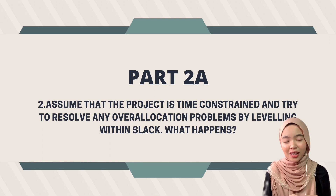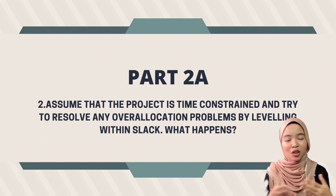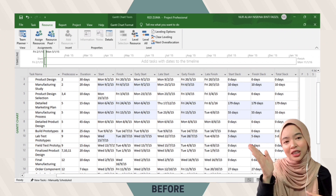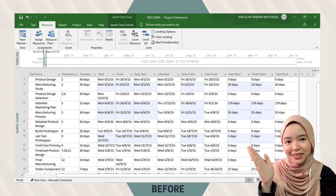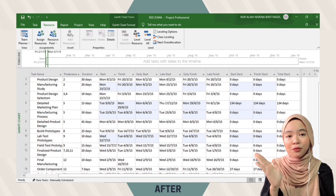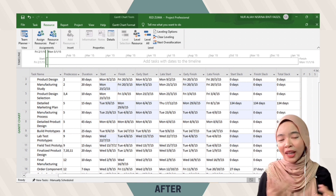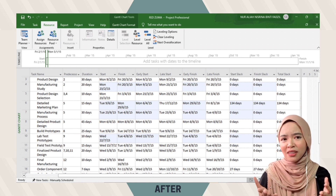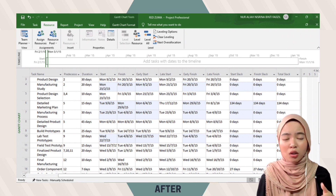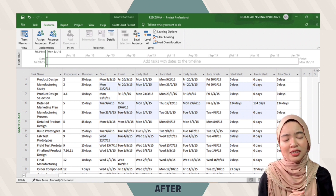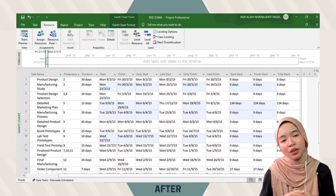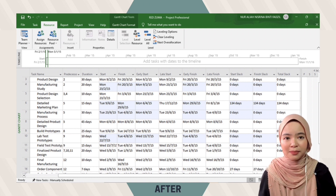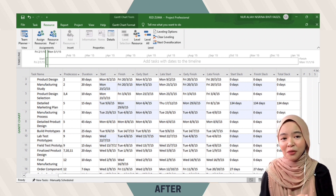Assuming the project is time-constrained, we try to resolve the over-allocation problems by leveling within slacks. This shows the project conditions before and after leveling within slack. The over-allocation from the detailed marketing plan was eliminated when we leveled the slack, but not all over-allocations were resolved. It decreased the manufacturing study slack from 10 days to zero days.